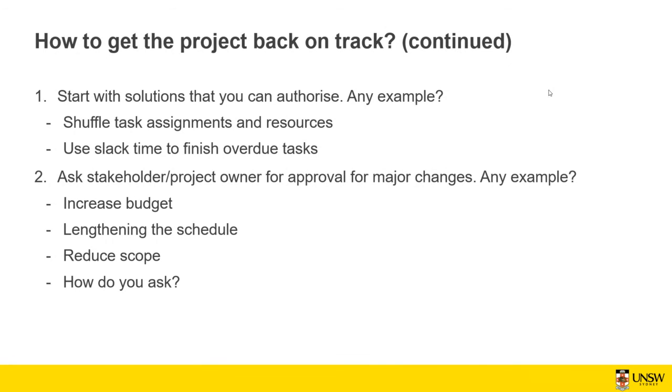In the bonus mark question, PV and BAC are the same value. Yes, that's right, because in the question, we are at the end of the project. And that was the cumulative PV in that question. Because we are at the end of the project and that was a cumulative PV at the end of the project, it equals the budget at completion.